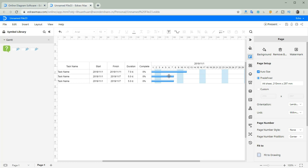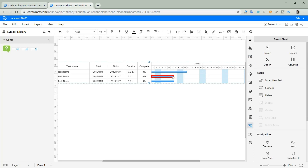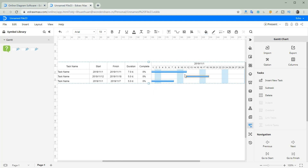Hover your pointer on the taskbar and move it when the cursor becomes a four-direction arrow. You can also change the complete percentage when the pointer is on the beginning of the taskbar.